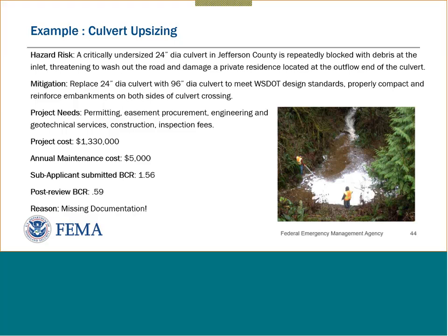And after going through the National Technical Review several years ago when the project was submitted, they reran the benefit cost analysis with the documentation that was provided, and it went down to 0.59. Why? It didn't have sufficient documentation for the data provided in the benefit cost analysis. Next, please.